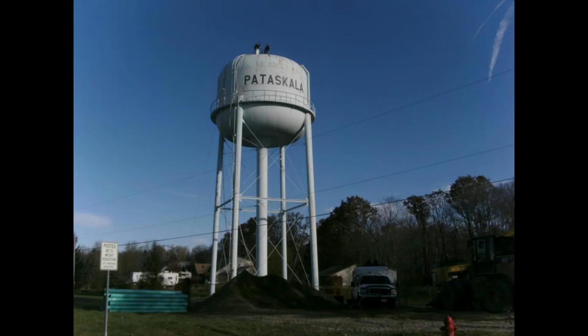The one thing that I did want to bring up just real quick was we're definitely looking at funding sources for this. We need to move quickly, obviously, because we've talked about the plant being at capacity and the EPA getting anxious about issuing PTIs moving forward. So one of the things that we looked at is possibly residential TIFs that would be able to cover the note of a loan that would need to come out for this type of project. So we're working with the administration to try and find a way to fund this with minimal impact on the existing funds the best that we can.